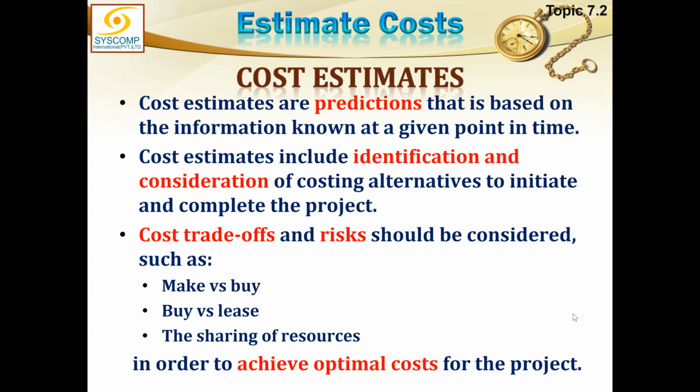The decision whether we'll be doing this job ourselves or it will have to be outsourced. This is the make or buy decision. And this decision is dependent on three things. Number one, the capability. Number two, capacity. And number three, the risk.